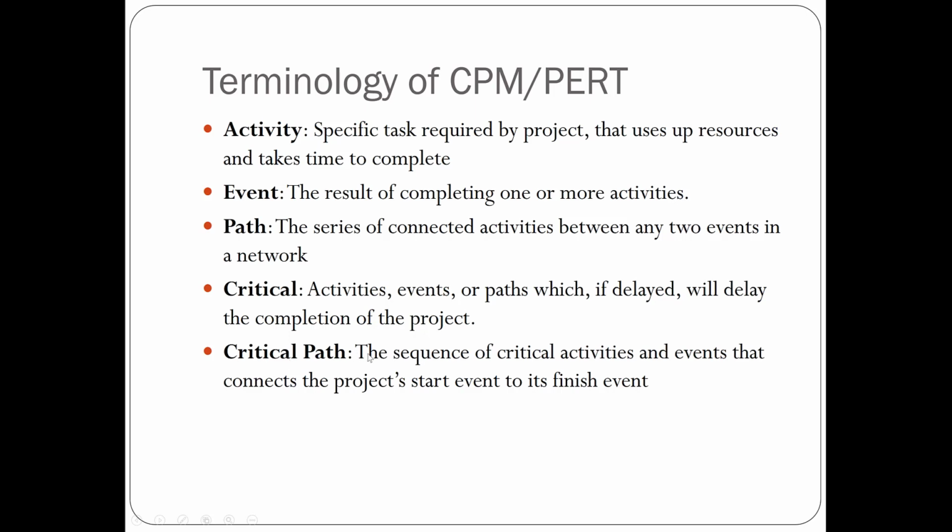And critical path will be the sequence of critical activities and events that connects the project start event to its finish event. So all the activities on that critical path are the ones that cannot be delayed, otherwise the entire project will be delayed.